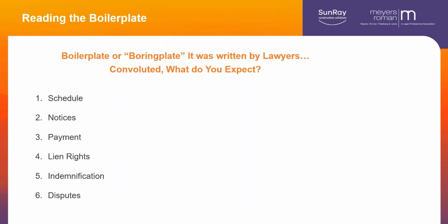Notices. One of the things about notices, you'll use some of the notices. If there's a dispute, you frequently have to give notice within a certain period of time. If there is an unanticipated condition in the project, a subsurface condition you didn't know was there, you have to give them notice, and you have to know how you give notice.